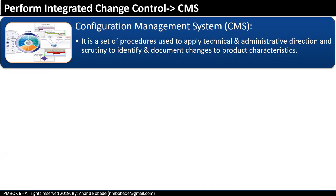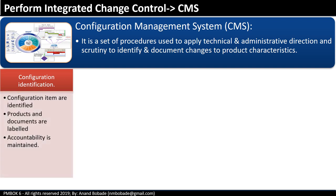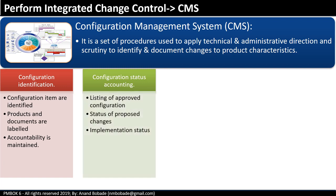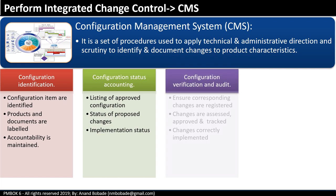Configuration management is a three-step process — you can always expect one question on this. The first step is configuration identification, where configuration items are identified, products and documents are labeled, and accountability is maintained. The next step is configuration status accounting, which refers to listing approved configurations, status of proposed changes, and implementation status. Finally, configuration verification and audit ensures corresponding changes are registered, assessed, approved, tracked, and correctly implemented.